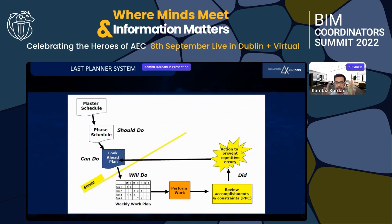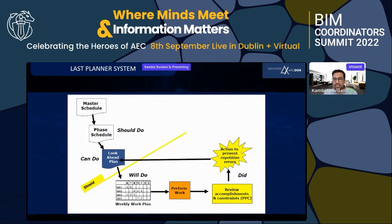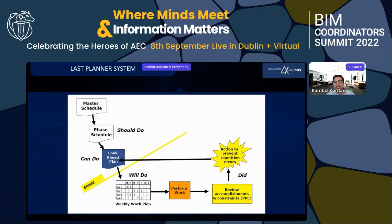Starting from a master schedule, then phase schedule, then lookahead schedule, we brought boards into the company for the last planners. The primary function of the Last Planner System is a collaborative planning process that involves last planners in planning in greater detail as the team gets closer to doing the work. The Last Planner System incorporates pull scheduling, whereby only work that can be done is promised by last planners in weekly work plan meetings, as opposed to conventional push methods.